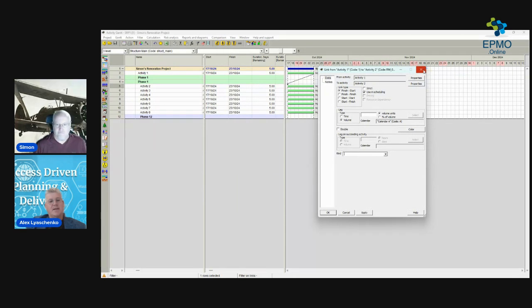Yeah, so which means your successor may have a strict start immediately after one of the predecessors. It's not just finish-start. Finish-start always means you can start anytime later after the finish. So anytime. Tomorrow, so next year. Strict just keeps that finish and start type together.